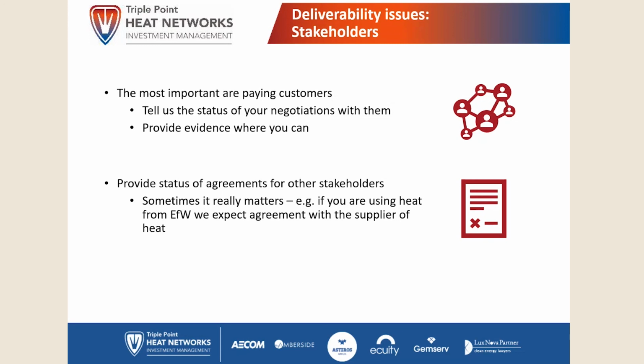So at commercialization stage, we'd want to see evidence that you are in discussion with potential customers, that ideally you might have a memorandum of understanding or some sort of commitment in writing that your target customers are on board and are negotiating in good faith for a connection, to make us feel confident that those customers are going to come forward, and that the estimate of heat sales and hence revenue are reasonable.